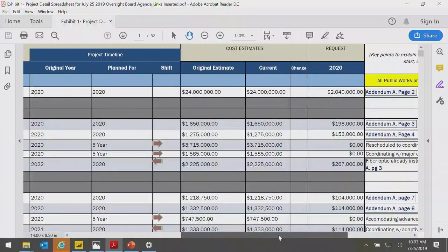For that project, we're asking for a little over $2 million in order to start the design of this project. And as we talked about last time, all of these projects involve design. There's one project that involves installation of equipment. We're starting the program at the moment, so there's no construction money that we're requesting. As these projects progress, you're going to see these projects again, and at the appropriate time, we'll be requesting construction dollars for the same projects. So that's the explanation of the first line.